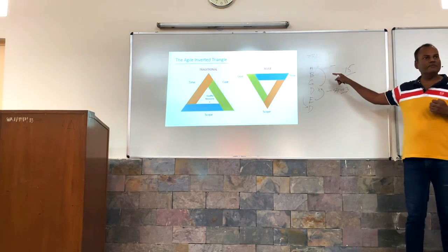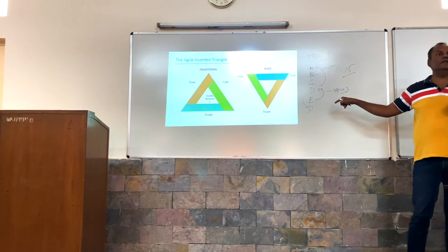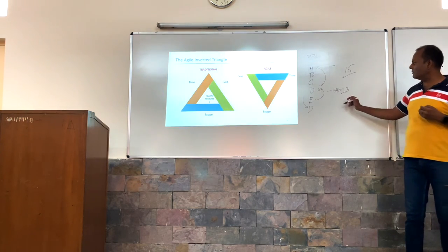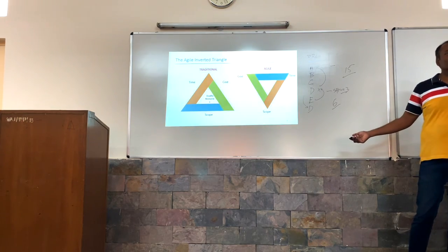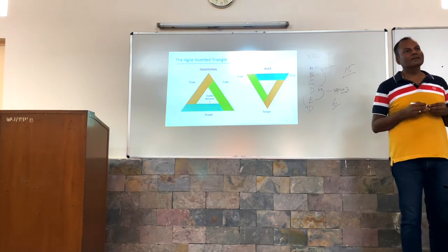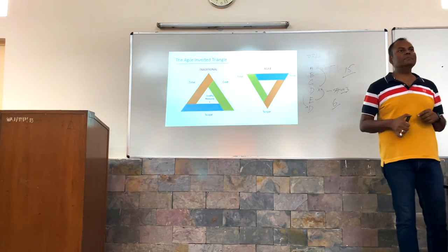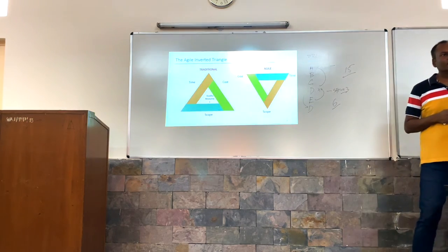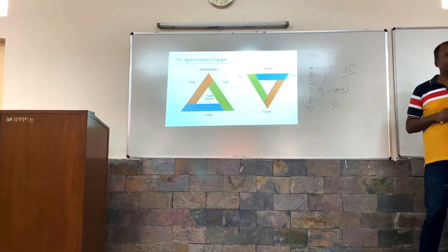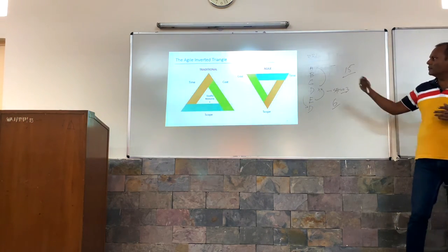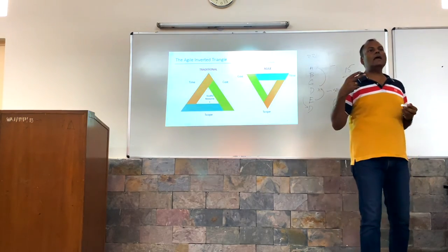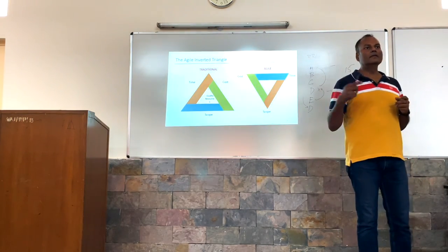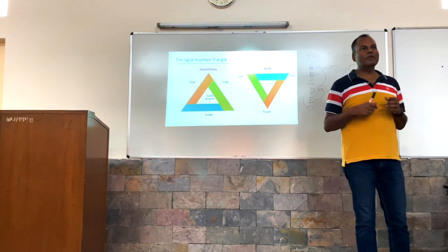Do you need this in sprint 1 or in sprint 2? And you gave me money only for 6 sprints. I cannot run beyond 6. Then the customer will have to pay extra. Your customer needs to pay extra, which means cost or time may undergo revision. It may be both. That's why mostly Agile projects run as time and material projects, where you can vary your money part.